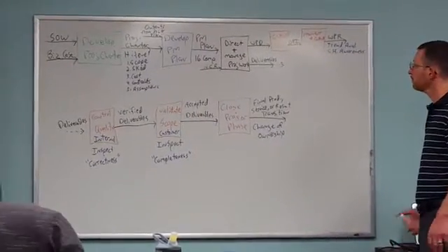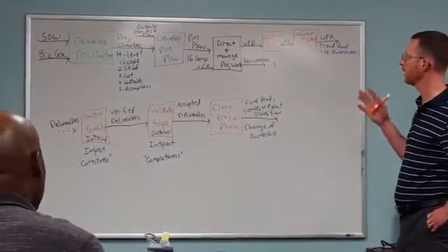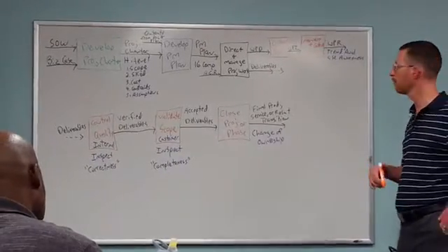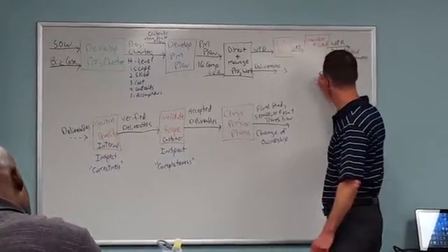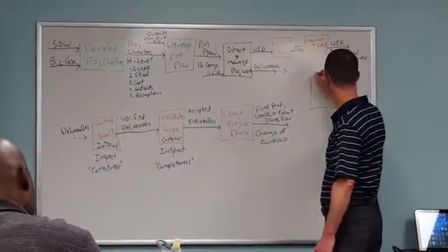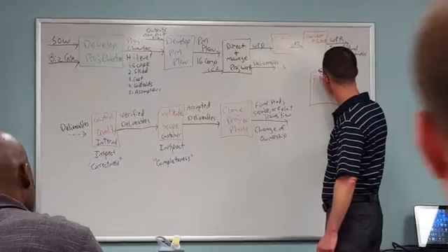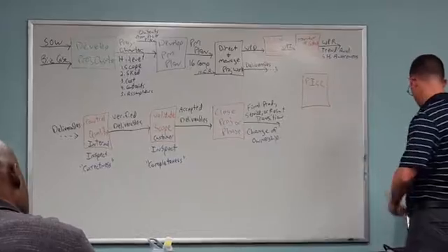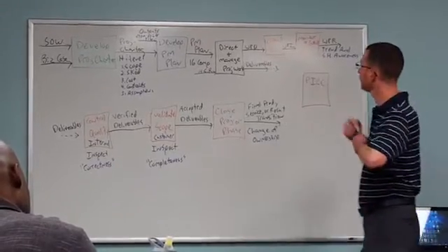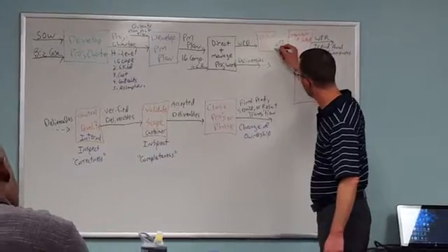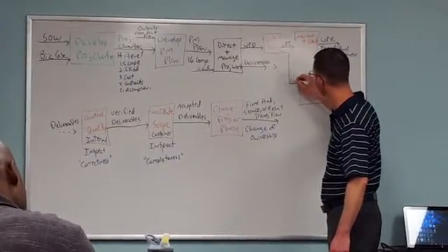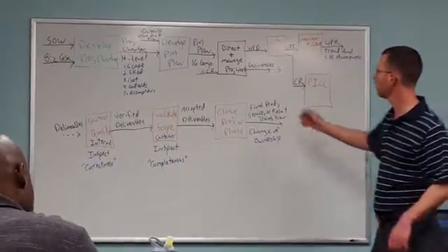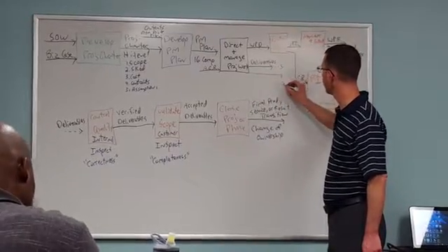Okay, so what we've done here is we talked about everything in integration management except for one process, which is perform integrated change control. So perform integrated change control, I'm going to draw it right here. And I'm just going to call it PICC. So there's a lot of inputs to perform integrated change control, but the main thing is change requests. And change requests come from a lot of places, but primarily from control processes. So that's why I'm going to put that there. And we'll also do it here. Change requests can come from direct and manage project work.